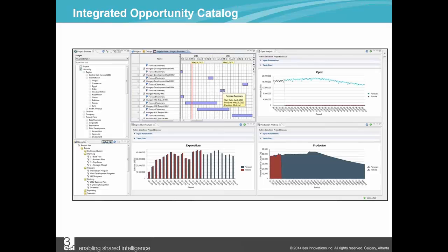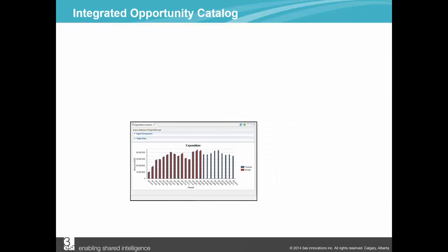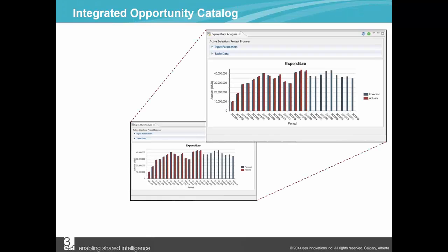Looking at those capital dollars as they're being spent, assessing our spend profile, and determining how accurate we are to budget allows us to better estimate what our required contingency is, which areas are more accurate than others to inform more effective long-term strategic planning, and allows us to do trend analysis to make the forecasts themselves more accurate so that when we do make our plans, we are more likely to hit them, meaning that we have more resources available to plan because less of them are held for contingency and for the unknowns based on a history of non-compliance to plan.